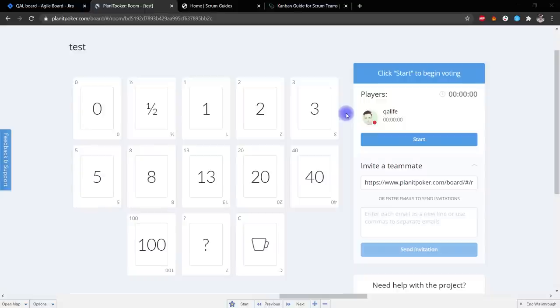And in case, after this explanation, we have the same ideas, that is, someone can convince someone that indeed it is not one story point but 13, we re-vote and again look at how we voted. And so for each user story. Once more team members have voted equally and evenly, and there are no more big dropouts, we decide how many story points to assign to each user story.